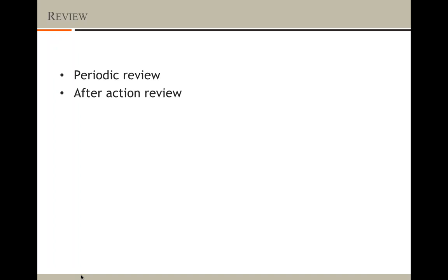Lessons learned from after action reviews are extremely valuable. Get people on your team to talk about and internalize them. Then apply those lessons as you develop new goals. Also consider these points as you move forward: if the previous goal was too easily achieved, make future goals more challenging. If the old goal took too much effort, make new goals a little easier but still challenging. If you noticed a skill deficit while pursuing a goal, make attaining those skills a goal for the future. And if a goal was unrealistic, make sure the new goals reflect your organizational realities and time constraints in a better manner.